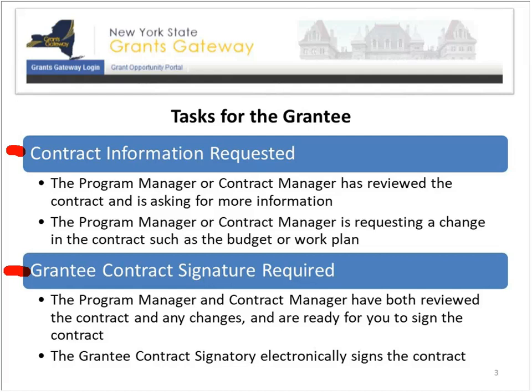signatures. And like I said, we have to allot maybe more than 30 days for this process to happen, because you sign it, or someone at your organization signs it, and then somebody at the state agency signs it. Actually, the good thing, now that I think about it, is these don't have to go to the state controller's office or the attorney general's office, because it's year 2 of a multi-year contract. So that will cut down the time significantly. But again, you're still trying to do it as quick as you can.